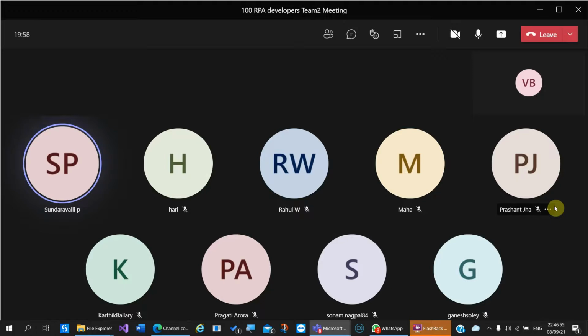We need to know which applications are involved when we do the change, and get permissions from those teams while stopping the automations. We need to get approval before performing a change. If we do anything unexpected, like restarting a bot, we have to submit the change within 24 hours. I told them like that, and they said okay.